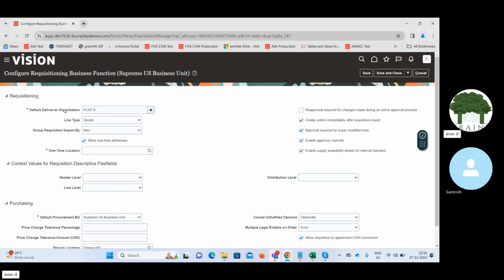Or if I have a negotiation in place, that is RFQ, request for quotation, I will compare supplier prices, say this is the quote that I'm picking, and using that I'll create the purchase order, and then I'll receive the item.